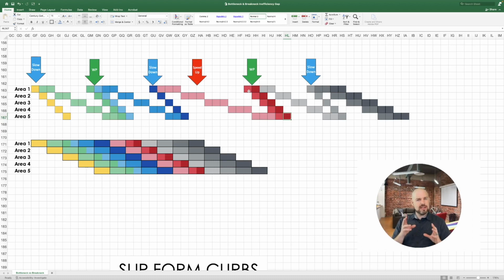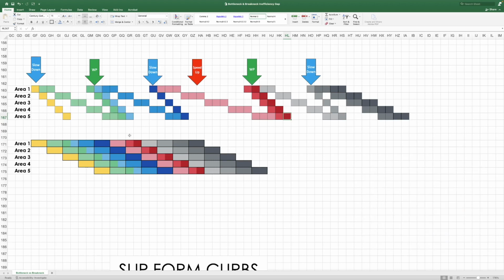But if we can look at it and be like, instead of having one crew do this and one crew do that, could we have a single crew do both in each area and complete it in that area and then move on and do both of those things at that time? And if we did that, this is what work packaging those together would look like. And so in work packaging, maybe this one's inefficient. It's like, yeah, we have to pay for multiple mobilizations, and that's our major cost plus whatever we do at our bottleneck.